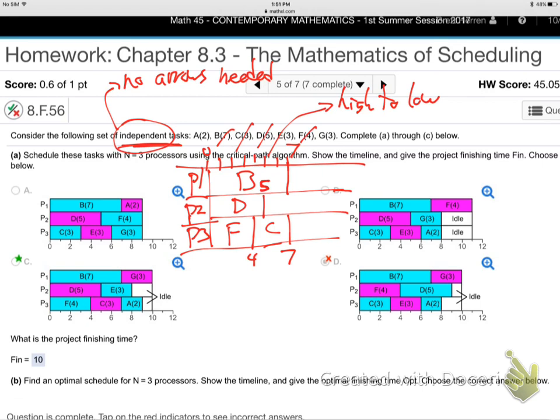So you always do whichever processor is ready for a job first. Processor 3 was ready after Forrest gave job C, because that was the next highest one. And then right here at 5 hours, processor 2 is ready. Processor 1 is not going to be ready until 7. So give him the 3-hour G job. 5 add 3 will take him out to 8. For the G job. What else remains?